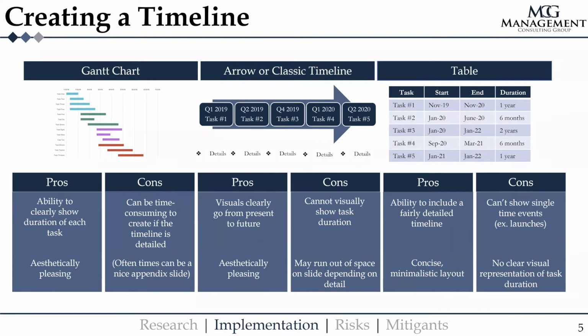You don't really have a visual to it though, and that's where the con comes in. There's no real visual representation with this table. And this could be a problem with some things. For example, if you look at task 3, it takes 2 years, which means that task 4 is actually occurring at the same time as task 3.